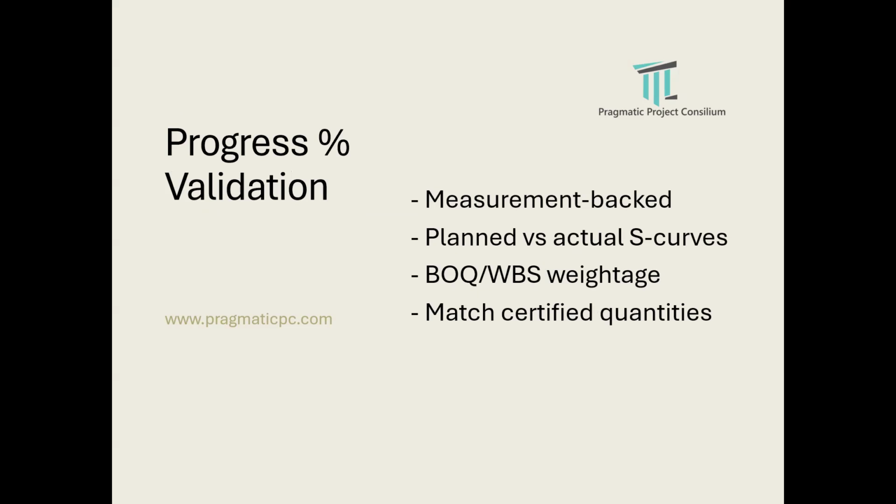Project percentage validation. There will be a measurement backup sheet for every progress measurement, like for engineering, procurement, construction. There will be a separate percentage of completion. So these Excel sheets will be maintained separately and the data will be collected from the specific departments.